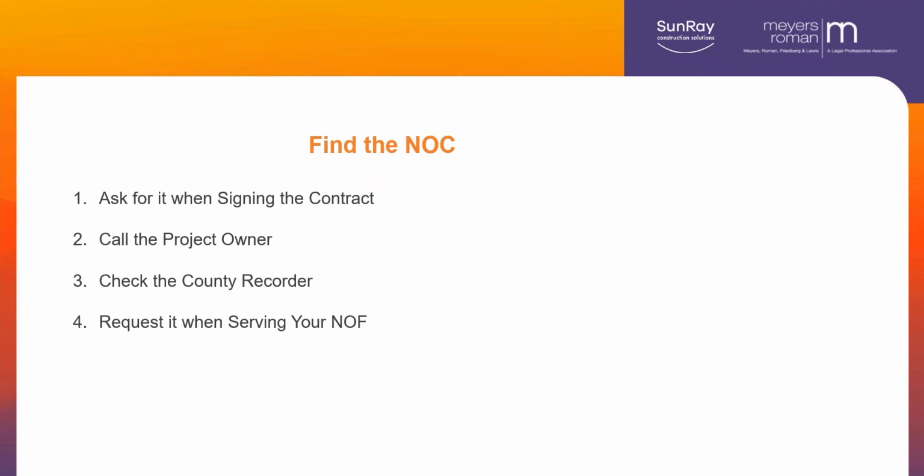Now, let's go back to my client who sends it with 3 days left. So I can't find it anywhere. First of all, I had to spend a day looking for it. But then they have 10 days to get it back to you. Now you've passed the time period for full lien rights. And in Ohio, you get a kind of a makeup piece. Unlike Florida, as an example, if you're late in Florida, you're late, you've got no lien rights. In Ohio, you've got to do it within this 21-day period, but it's a sliding window. So if you served it on day 1 through 21, you're good.